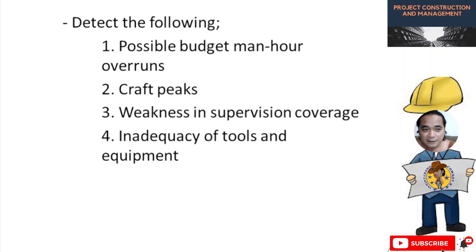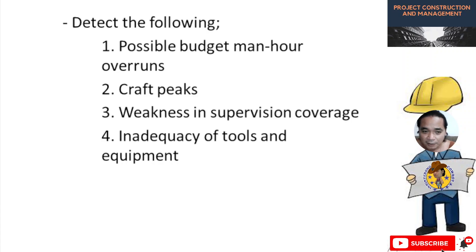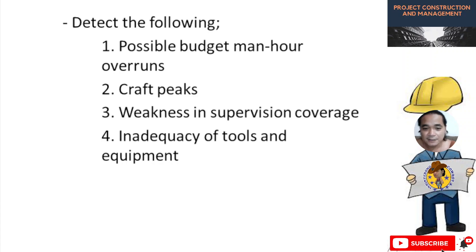If you are constantly monitoring your project, these items can be detected: number one, possible budget overruns; number two, craft peaks; number three, weakness in supervision coverage; number four, inadequacy of tools and equipment — meaning you are lacking tools and equipment which are a hindrance to completing your project. For example, if you don't have a concrete cutter or a jack hammer needed for demolishing concrete, you cannot finish the job.